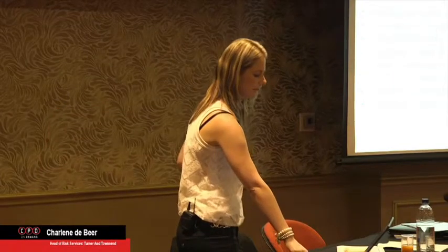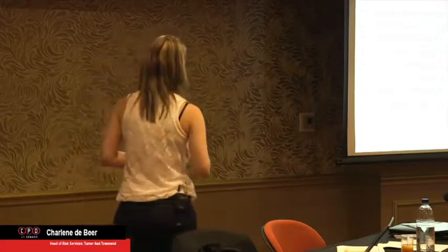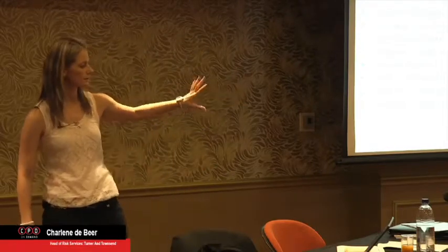Contingency drawdown follows cash flow and not the execution schedule. So what it means is if we do a drawdown from contingency, the risk management plan that you're supposed to have should say that you will follow a project controls notice, which will give you the right to do a drawdown. The project controls notice will say, this is in the risk register, it's been identified, I need X amount of contingency to pay for it.